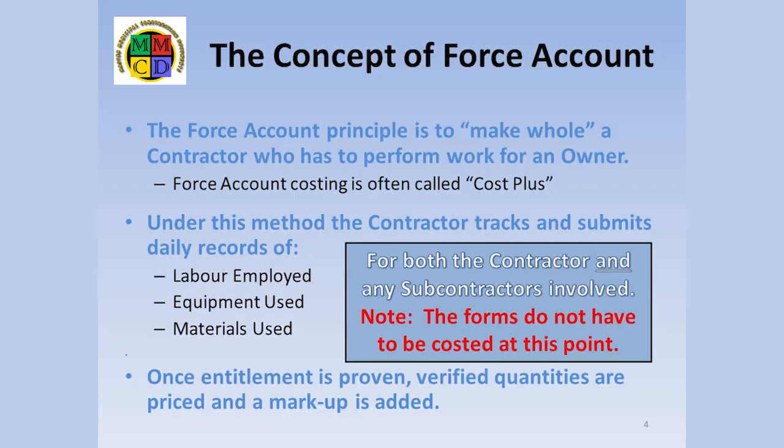This reporting must include not only the work done by the contractor, but also any work done by subcontractors. It is implied that the CA, or more likely an inspector, will verify and sign off the quantities submitted on a daily basis also. If there is any disagreement about a quantity, attempts should be made to resolve it while the facts are fresh in everyone's mind.